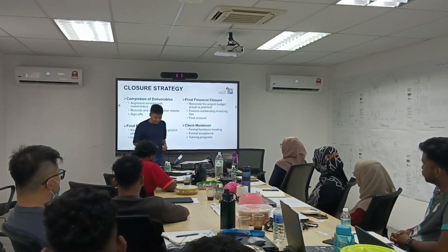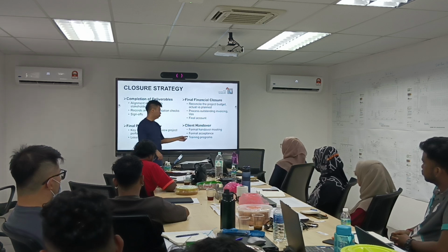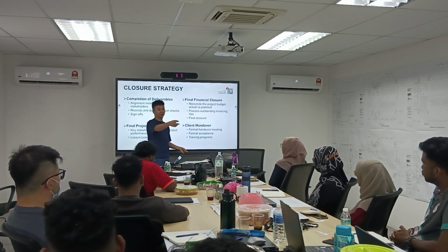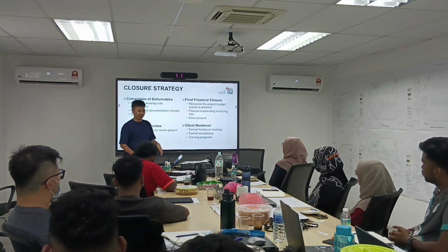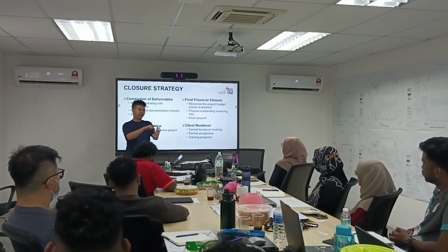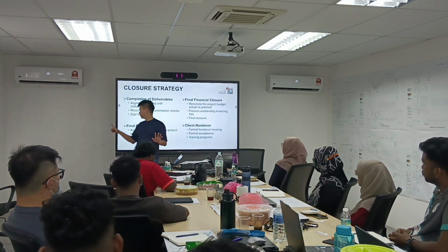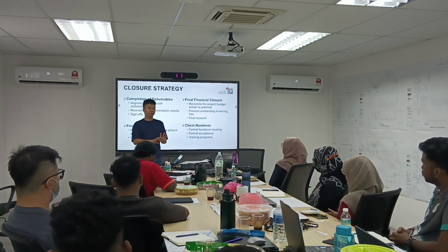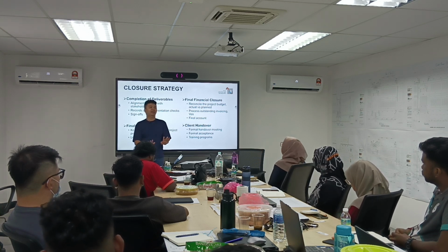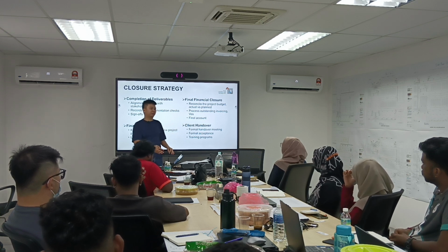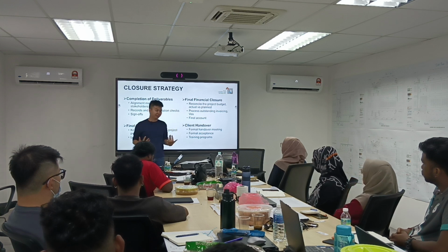When I say everything is signed off, it means really everything we give to people already lah. So normally it's after the training is done. Even with the training done, we should have a formal handover meeting and tell the customer, look, all these deliverables that we requested in this meeting are already fulfilled. And the site, everything is already online. The key, I have passed you everything already, password, everything I gave you already. Look, today is a formal date. I tell you that we have ended and we're going to leave the site.